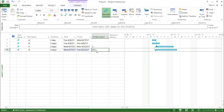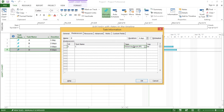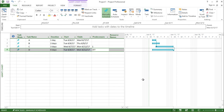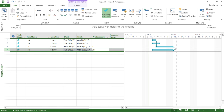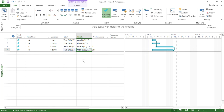Now let's try the third option. I'll double click again, hover my mouse to the type of predecessors, click on the drop-down box, and select finish to finish. I click finish to finish and hit OK. If you see on the right-hand side of my screen on the blue bars, task C and task D have a finish-to-finish relationship. On the left-hand side, the finish date has changed — the finish date for task C and the finish date for task D are the same.